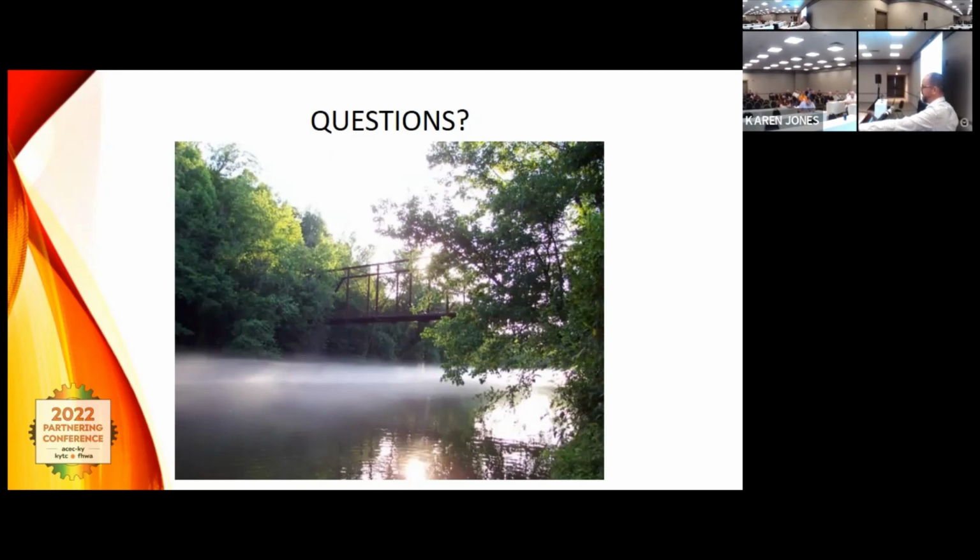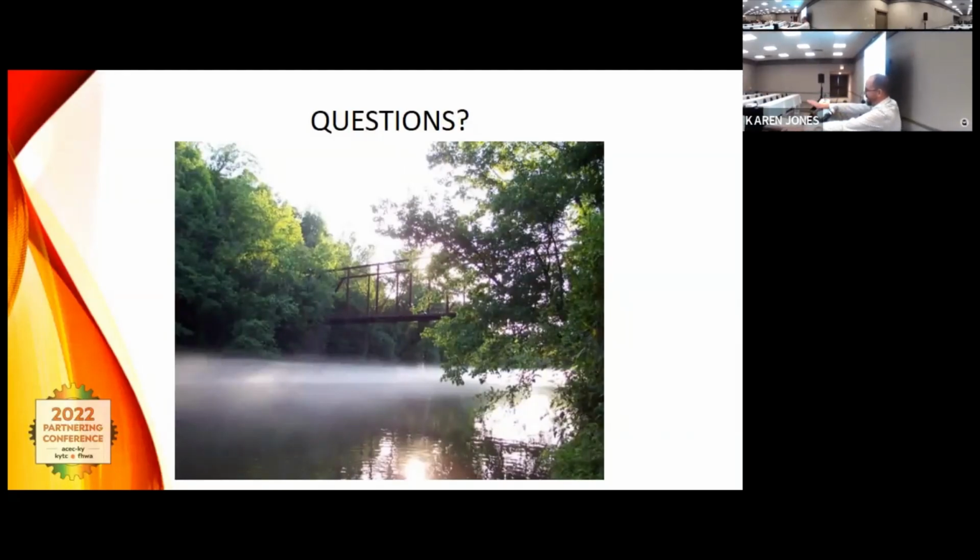Yeah, so we have had to do that in the past. Come to me and talk about if there's a way we could segment that project, but essentially we've had to do that in the past where we've let one section, but we went ahead and paid mitigation for all of it, which is not ideal because I know that the forecast for when those next sections will even be let is sometimes impossible to know.